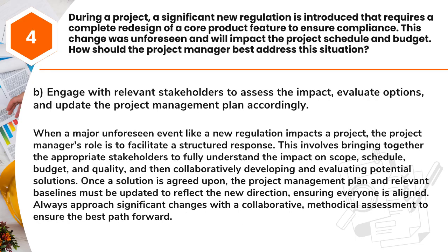Answer: B. Engage with relevant stakeholders to assess the impact, evaluate options, and update the project management plan accordingly. When a major unforeseen event like a new regulation impacts a project, the project manager's role is to facilitate a structured response. This involves bringing together the appropriate stakeholders to fully understand the impact on scope, schedule, budget, and quality, and then collaboratively developing and evaluating potential solutions.